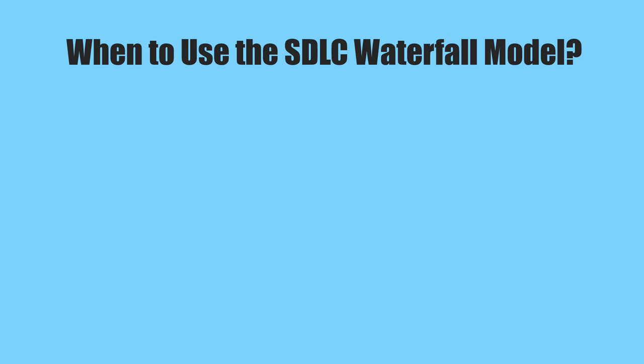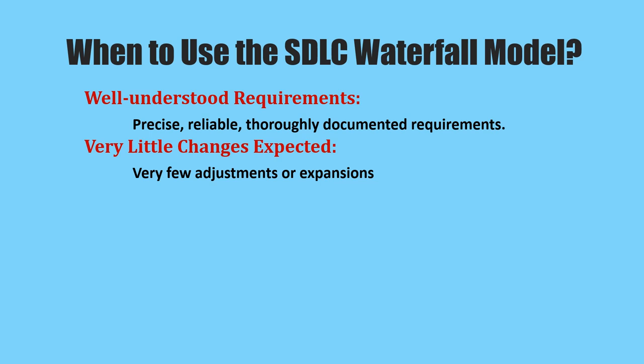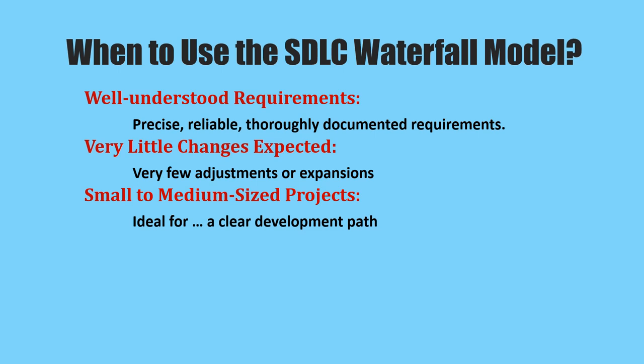Well understood requirements. Before beginning development, there are reliable, precise, and thoroughly documented requirements available. Very little change expected. During development, very little adjustment or expansion to the project scope is anticipated. Small to medium size project. Ideal for more manageable projects with a clear development path and little complexity.